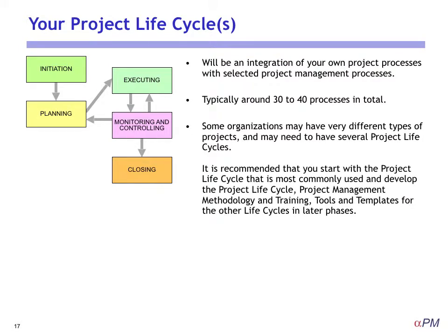And you're going to have many different types of projects, and you may need to have several project life cycles. But I do recommend that you start with the project life cycle that is most commonly used and develop the project life cycle methodology, training, tools and templates for the other life cycles in later phases. If you try to tackle them all at the same time, I think it'll both cause you some grief, plus it will delay the start of introducing anything, and you'll probably go round and round in circles.